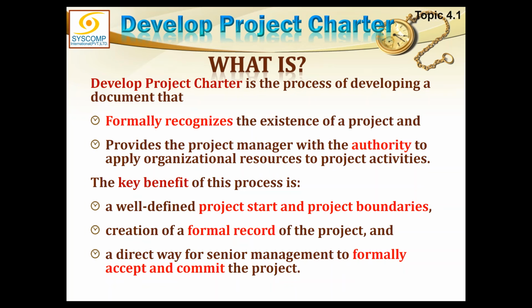The key benefit is, number one, a well-defined project start and project boundaries can be defined. A formal documented record of the project is created. And it is a direct way for senior management to formally accept and commit to the project. Once we create this charter, the higher-level management would agree to it, sign it and say, okay, we agree to this charter. Now you can give it to the project manager and he can start working. So it's a formal acceptance of the project.